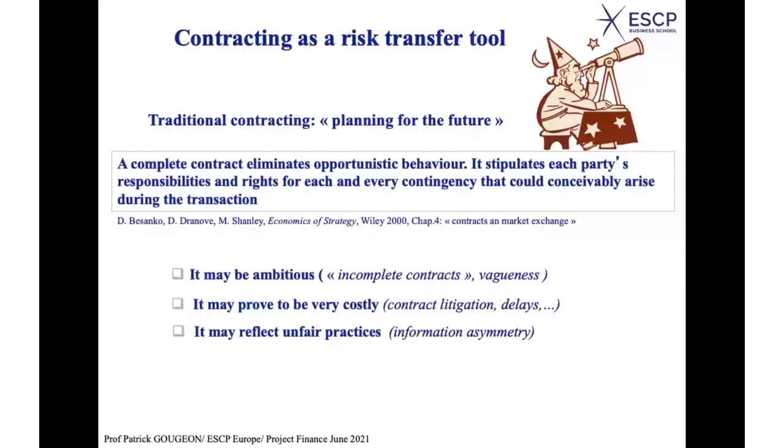He will make money by coming to you later, okay, we signed this contract, you asked me to do this and this and this, but look at this. You know, it's very dangerous if you don't do it, you have a safety issue there. And then he will say, okay, I can do the job, then he will charge extra. And he will charge so many extras like this. That is his main source of profit.